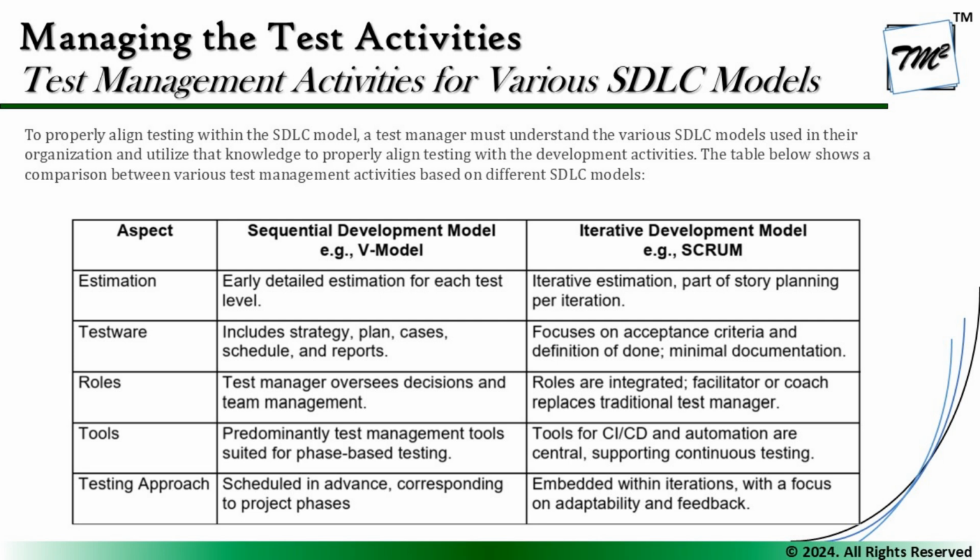sprint planning takes place as an activity, and it should be done as a part of story planning in every single sprint. However, if you remember from the foundation, we already told you that we do have planning in the iterative models in two different phases. One is release planning and another is sprint planning. Release planning will be more for the entire release altogether, so a set of activities which will be performed as a part of the scope of the release.